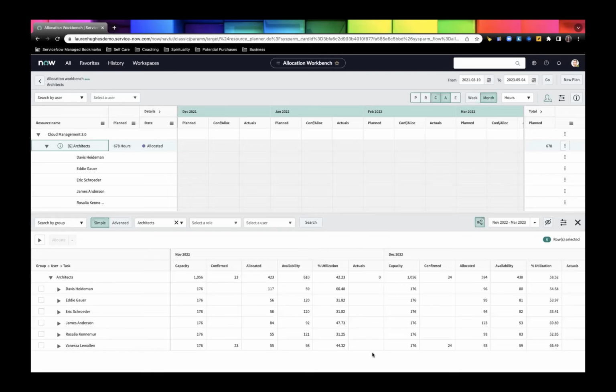I would set up their resource record the same. They would be in a resource group with a resource schedule saying what their capacity is. Then, as far as incidents and everything, you can have the hours from all the system tasks basically roll into resource management. So the problem is setting up how people track time for incident work more than it is that not rolling up. It'll automatically take the hours that they're actually working out of that, if you're tracking the time for people that work on incidents. But that's where you have to build the linkage.